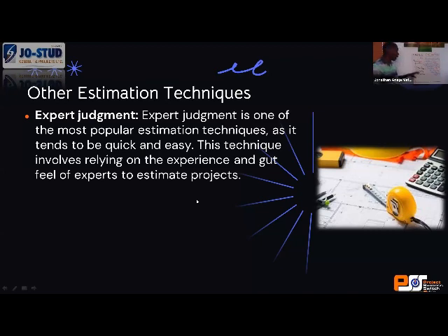I don't know if you can see my screen. I've done a lot of analysis on top-down. For instance, somebody tells you, I have 10 million naira for a 3-bedroom bungalow. It's your job now, using methods, to ask, okay, what percentage of a 3-bedroom bungalow can a foundation be? So, for example, if the foundation is 20%, you will take 20% of the cost and allocate it to foundation, maybe 25% to superstructure, 30% to other aspects. So it's easy for you to give the client a rough estimate.